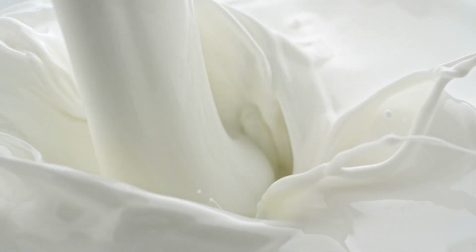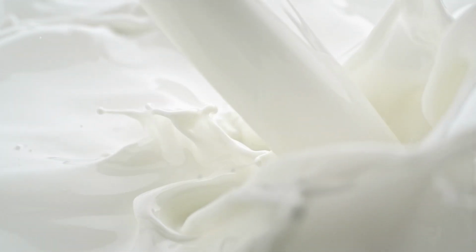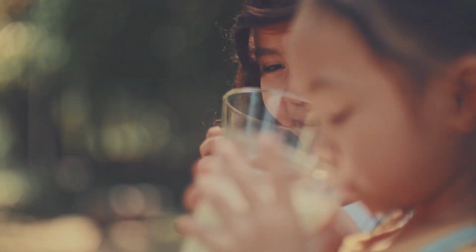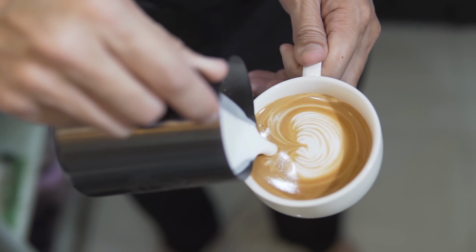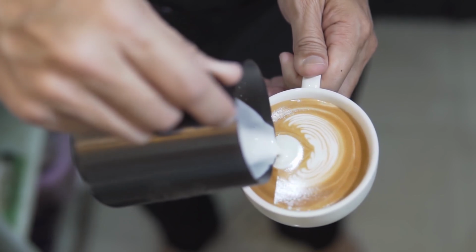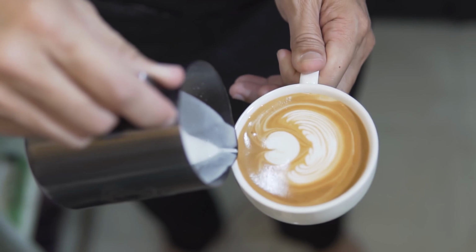Freebie almost. We had to pay for the freight. But it gave us a chance to bring things in and actually run pumps and say, hey, I want to go from this place to this place and check out all the valves. And again, most everything was good. There were a few times of, why is there milk on the floor? Stop everything. What just happened? Oh, we got a seal or cap left off, whatever. But at that time, it was only a handful of us around. And when was that? March 15th, I think, is when we ran that. February, March. Yeah. That was our first official run, and we're gonna mail this out to people.